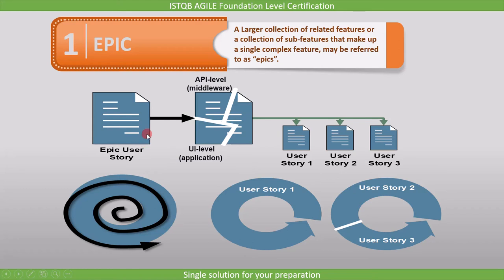One user story can describe what is required at the API level, middleware, while another story describes what is needed at the UI level application. These collections may be developed over a series of sprints. User story one can be implemented in one sprint, and user story two and three can be implemented in another sprint. The important point is each EPIC and its user stories should have associated acceptance criteria. This is all about EPIC.